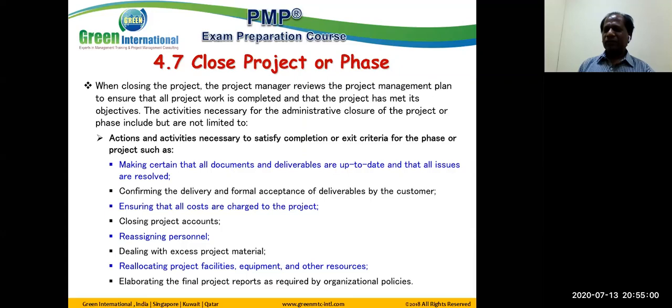Right? Yes. That's why we always insist, please prepare the closure documents along the way of work execution. Whenever you complete a deliverable, you go through the verification process, prepare the closure documents, and keep them ready. So it is all part of the closure procedure. When they come to the closure, they will be able to close the project easily. Basically, closing means what? We are demonstrating that we achieved the project work according to the stakeholders' requirements. That's what we are demonstrating.